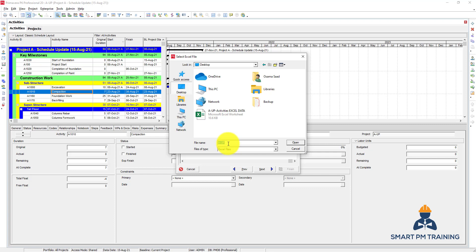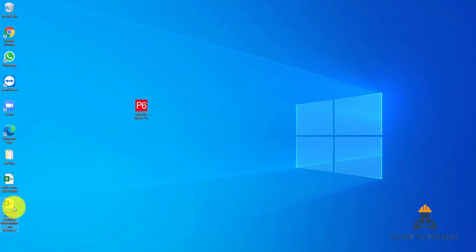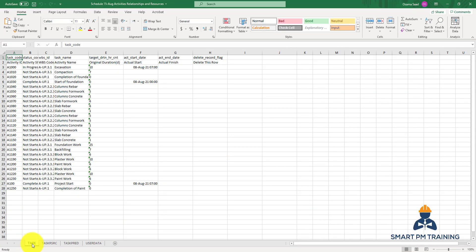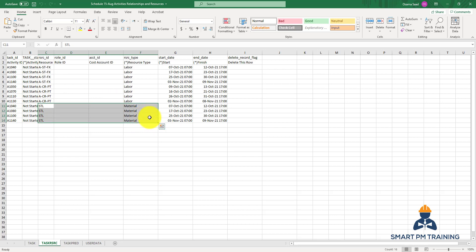Rename the file as 'Schedule 15th of August - Activities, Relationships, and Resources'. When you open the exported file, you will have separate tabs: 'Task' for Activities with all activity information, 'Task Resource' for resource assignments — showing steel rebar material assigned, plus carpenter and steel fixers assigned to the project — and 'Task Pred' for predecessors, which contains all relationship information including lag and predecessor details.